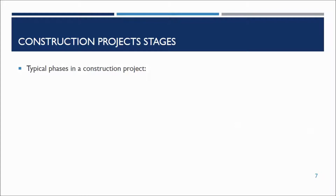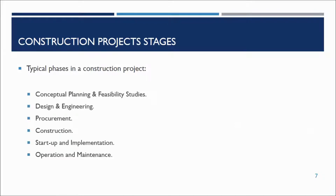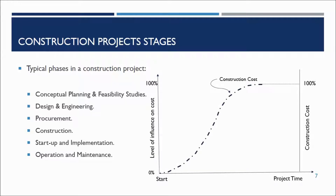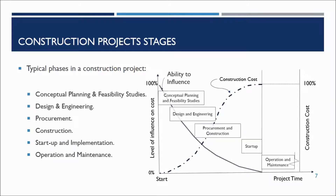Typical phases in construction projects are conceptual planning and feasibility studies, design and engineering, procurement, construction, startup and implementation, and operation. On the x-axis, the project time is presented, and the level of influence on cost is presented on the y-axis. The graph shows that the construction cost increases over time, and the ability to modify decreases through the mentioned project phases.